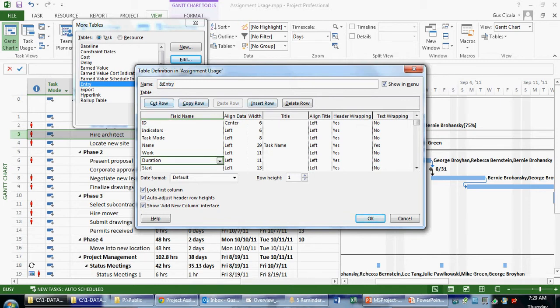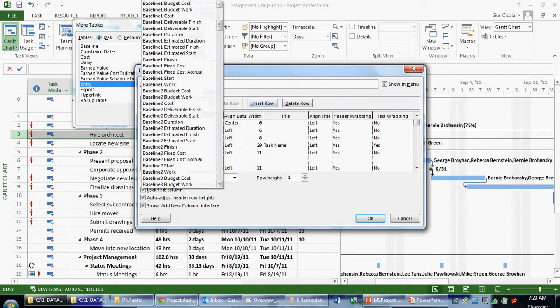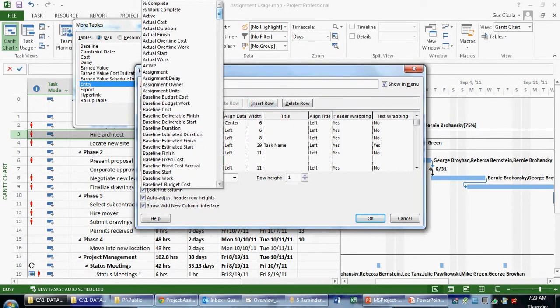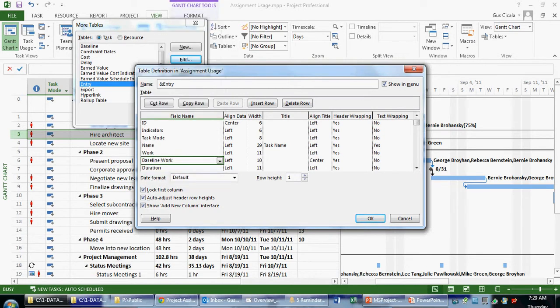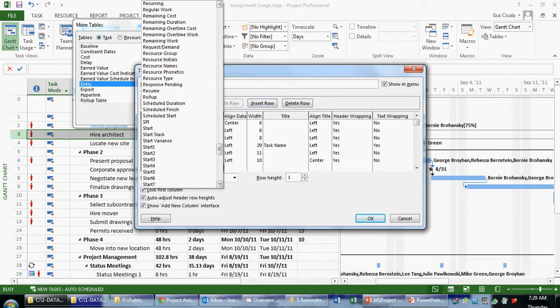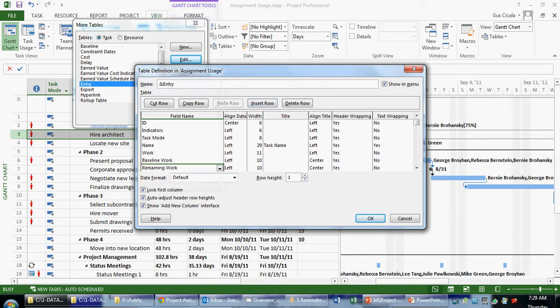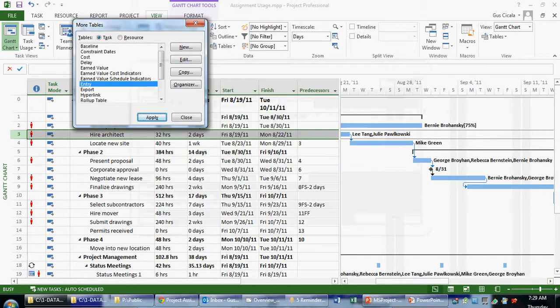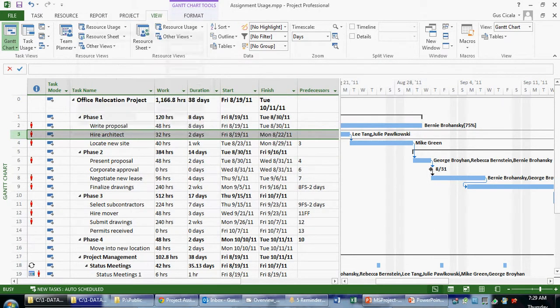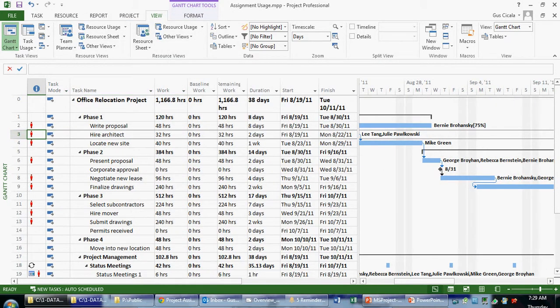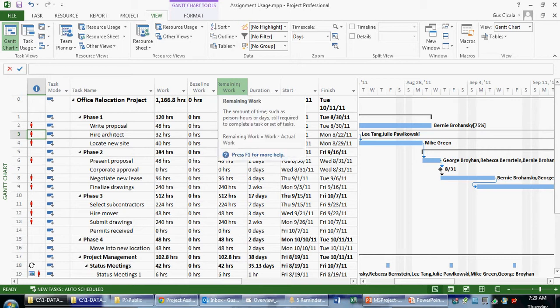For example, here, if I insert here, I might have other work-related fields that I wish to view. For example, there's something called baseline work. I could also put another field in here. In this case, I might want to see something called remaining work. Now when I've added the work, the baseline, and the remaining work to the entry table, I can click OK. I can click Apply. And now I see work, baseline work, and remaining work in this view.